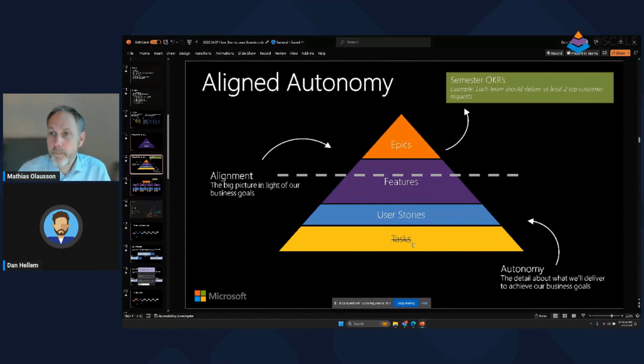Yeah, well, part of it is because we own a part of the product and another team owns a part of the product. We don't have a ton of cross stuff happening very often. We just kind of own it and do it and get it done. And when we do, it's very limited. So we don't have a ton of dependencies across a bunch of different teams on a regular basis. And that's obviously what you want to strive for as well. So you manage dependencies by not having so many dependencies.